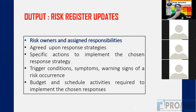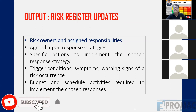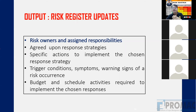All agreed-upon responses are recorded, along with the risk response owner for each risk — for example, a procurement-related risk is owned by the procurement department; a contractual risk may be owned by the subcontractor. Trigger conditions, warning signs and symptoms of risk occurrence are also recorded. Budget and schedule impacts are recorded — how much the risk will affect the cost baseline and schedule baseline — all updated in the risk register after risk response planning.